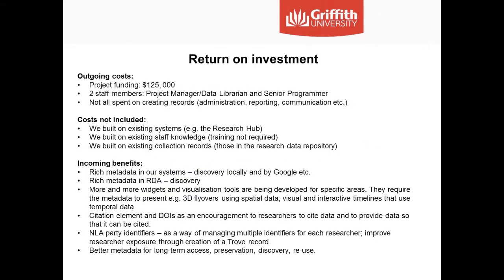To give an idea of the return on investment, the outgoing cost for this project, the project funding, was $125,000, and we had two staff members working on the project, but not all of our time was spent creating records. There was also time spent on administration, reporting, communication, and so on. The costs that are not factored into this number are that we built on existing systems, such as the research hub. We built on existing staff knowledge, so training was not required. We built on existing collections, such as those in the research data repository.